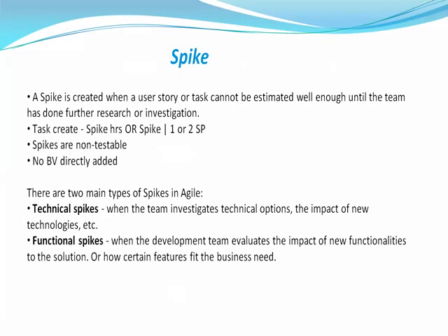And then usually those stories they create in Jira and keep, and they have very small estimates because we cannot spend a lot of time on analysis itself, right? So they will just give about 4 hours of effort required for the spike.